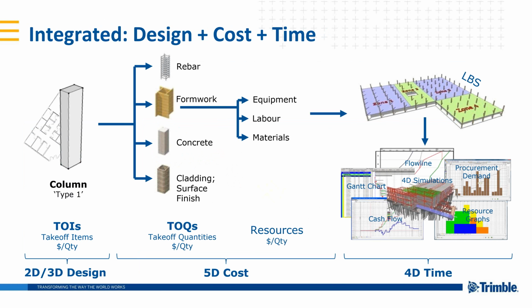There in the upper right-hand corner is the representation of our understanding that construction's not built all at once. You never have this big homogeneous building constructed all in one go. More often than not, it's going to be divided up into different locations. Maybe it's floor by floor, pour by pour, face by face, depending on your work structure. We support all that in the program. You can create the locations and get all of your quantities by location. And I think that's what really, really makes this program special.